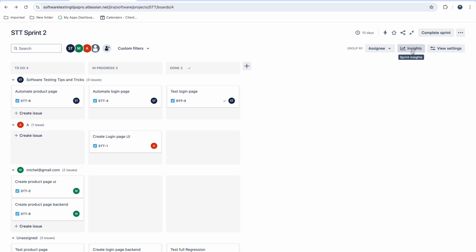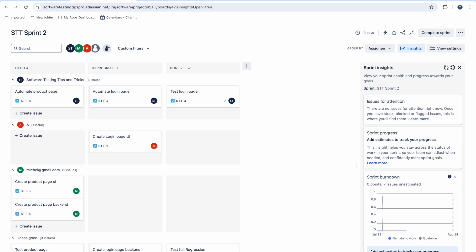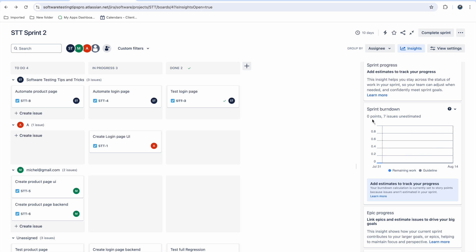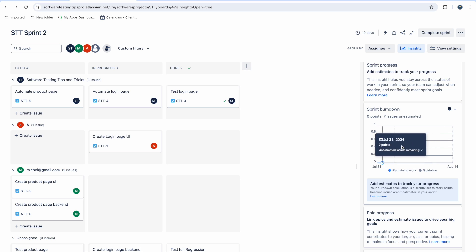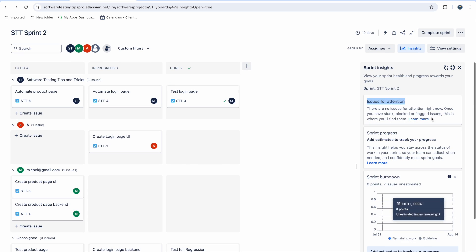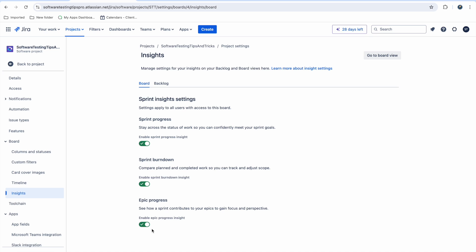The 'Insights' section is very useful. When you click on Insights, you can see issues that need attention — like if a deadline is approaching or a high-story-point issue is not being updated. You can also see how your sprint is progressing. Although I haven't assigned story points here, you can assign them and see how many are burning and how many remain. You can enable or disable which insights you want to see.